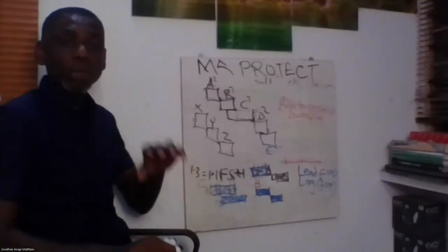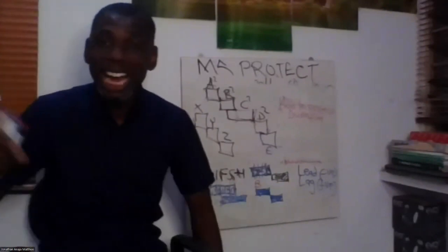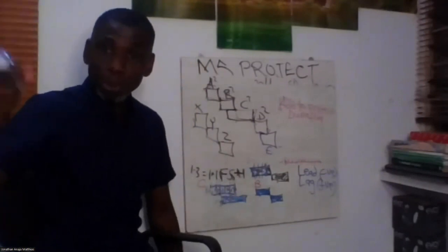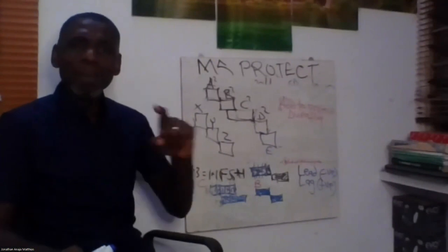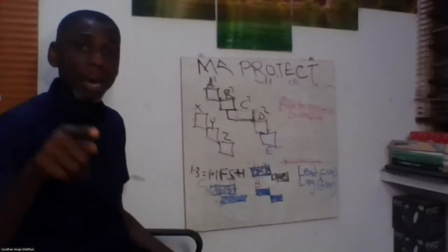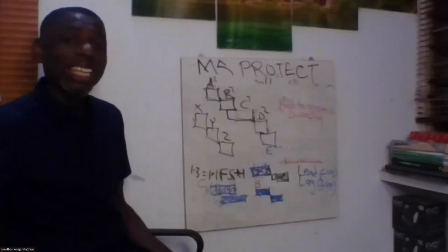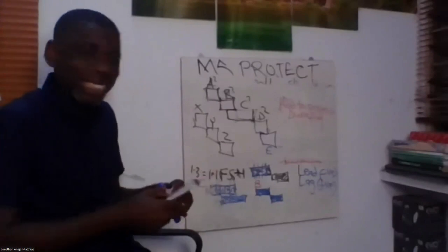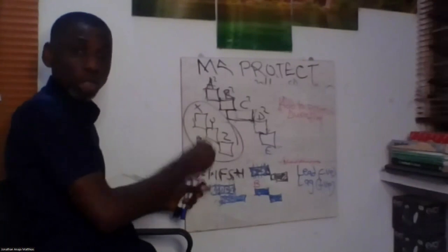The same way, when you want to fast track, doing activities in parallel, and time is running against you on any project, I can see most of us here are actually bosses on project sites, because I know some of us personally, I know we have a lot of project time. So it is advisable you check your critical path first before you start deploying resources. Ms. Banke and Johnson said crashing is applying resources. If you deploy resources and put more money on activities that have nothing to do with your duration, that are not on your critical path, you just wasted money.